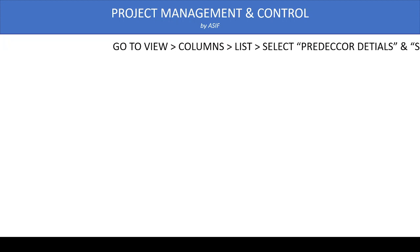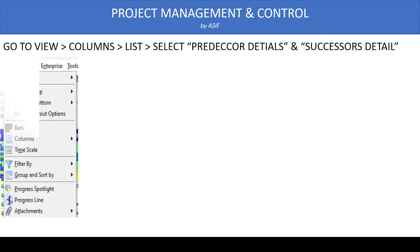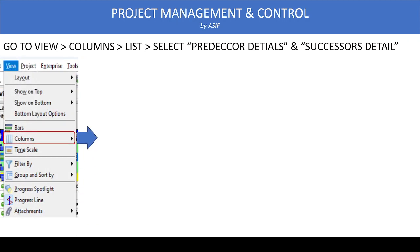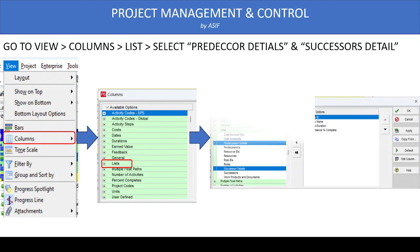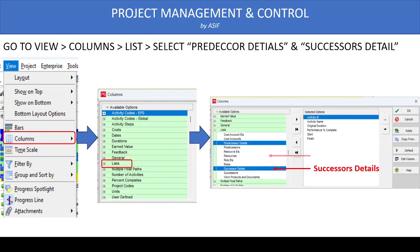For Method 1, we go to View, then Columns, and select the List option. From the list we select Predecessor Detail and Successor Detail and add these columns to our layout. Then we go through all activities one by one to see which are assigned with lag.